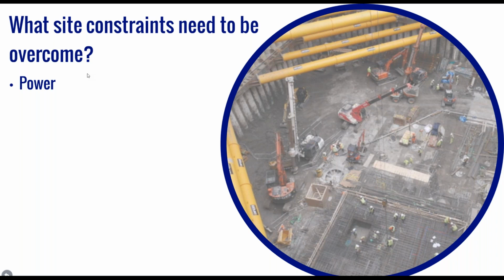If mains power isn't possible, then there are alternative options that can be considered, such as the provision of external batteries or solar panels. However, these options are generally not recommended because they involve additional costs and usually can lead to technical issues on site. For example, it's very easy to break solar panels if they're not handled with care, and we often rely on site personnel being trained to change external batteries where required.